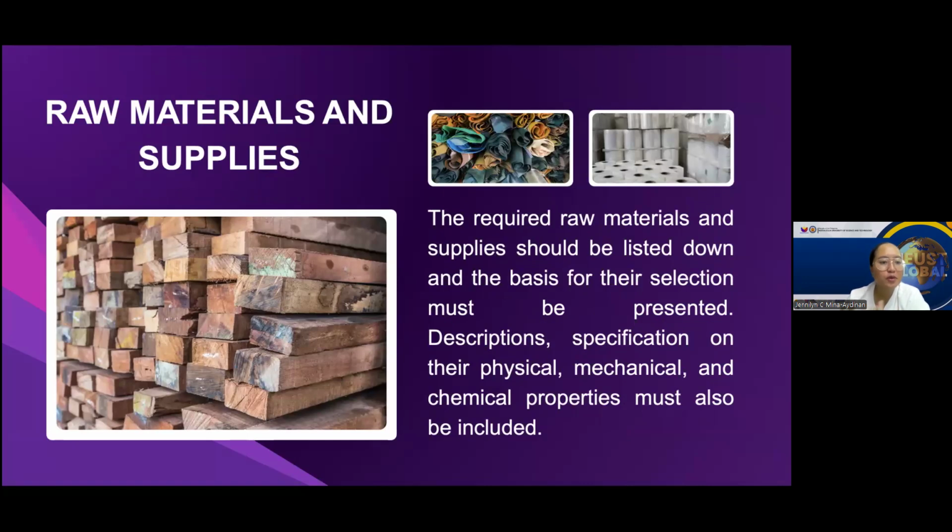For example, students producing eco-friendly paper bags list raw materials. In terms of quantity, 500 kilograms of recycled paper. In terms of description, it should be durable, biodegradable, lightweight. The unit cost is $2.50 per kilogram, sourced locally to ensure continuous supply. In terms of supplies, non-toxic adhesive and eco-friendly dyes for printing. Quantity and costs are outlined in a detailed table, and this breakdown really helps plan material procurement and budget effectively while ensuring production consistency.